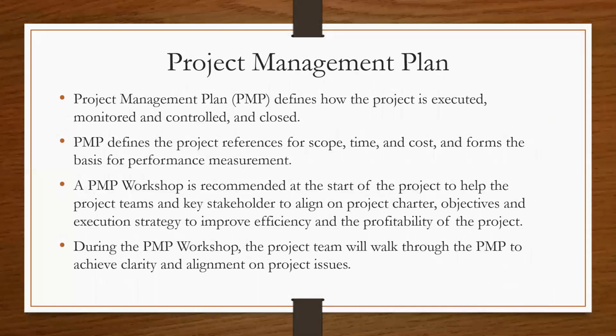Also, at the implementation stage, you begin to develop your project management plan. And this plan defines how the project will be executed and monitored and controlled. The project management plan also defines your reference for scope, schedule, cost, and forms the basis for your project performance measurement.